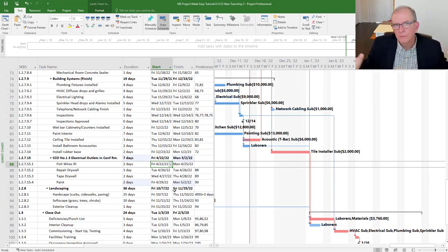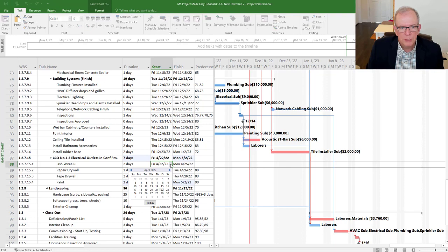Critical path is supposed to be free flowing, meaning when you adjust it, it adjusts everything forward from it. But if you put constraints forward from it, it may lock it up depending on the type of constraint that you put. So let's see the different ways I could do this. Maybe I'll show you one way with the constraints.